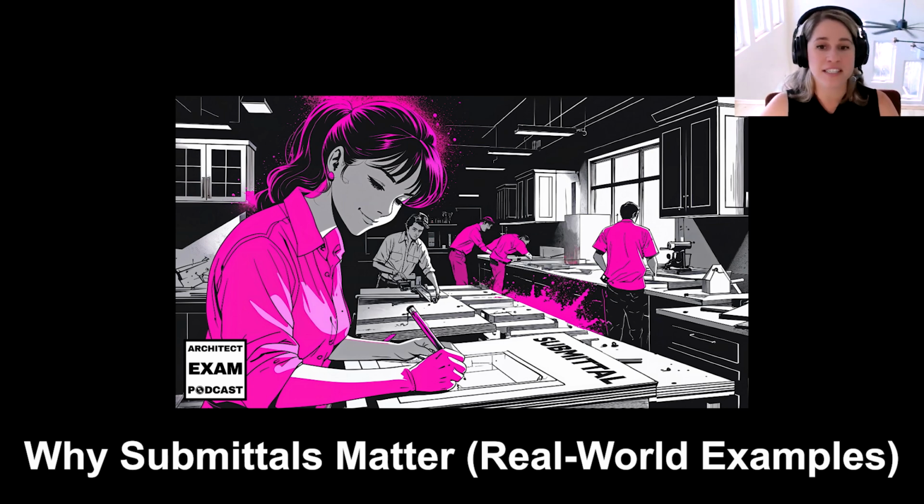I once worked on an office renovation project where the specifications were a little vague. They simply called for gray paint in the interior at the main lobby. So without a proper submittal process, the painting contractor chose what they thought was a light gray, and it actually had some blue undertones in it. And they went ahead and installed and painted the lobby. But when the owners saw the completed space, they really hated the tone of gray that was chosen. It clashed with the company signage and branding. So we actually needed to repaint the entire lobby.